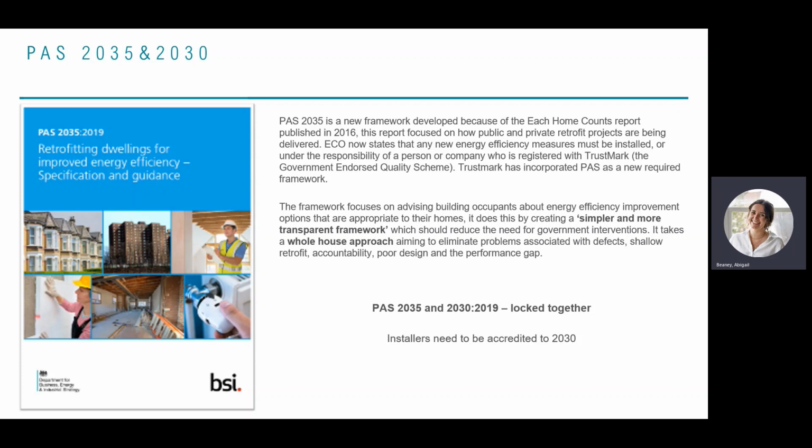When I say this, what we're really describing is that on a building site, you could have multiple trades. You can have your electricians, you could have your installers of insulation. Everybody is a specialist in their own independent part. However, what PAS really needs and what retrofit needs is that coordination piece, that person who can understand what is going on with the whole project to make sure that those interactions aren't going to cause issues with other interactions and therefore problems with the build.